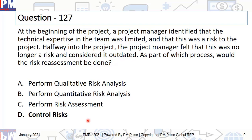The reassessment of risks is done in the process called control risk — that's when you come back to it. The first time is prioritization; this is quantification, basically further technical and mathematical analysis over and above qualitative risk analysis, only done for high priority risks. This is a tool and technique which is part of control risk — it's called reassessment. It's not a separate process, so the right answer is control risk.